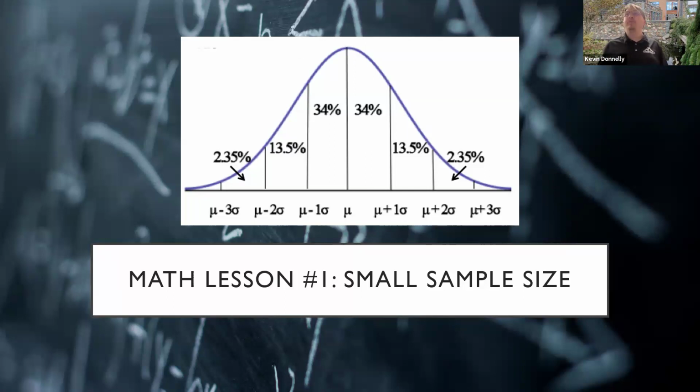So if you're familiar with the standard normal curve, you could have a valid test result that's way off to the left or way off to the right, in which case, based on the spec, it might be out of spec, even though the actual material is fine, right? But you just have these outliers that can pop up due to normal variability. And so that is what we're limited to because of time and money on a lot of these things. It's hard to do lots and lots of repetitions on it. There are things in specifications to try and attempt that, to test every 500 yards, or if it's a very large product, stuff like that. But in the end, often it's, hey, I need a number on a piece of paper that matches whatever the specification is. And that becomes a real challenge with the variability of the soils and materials we work with.